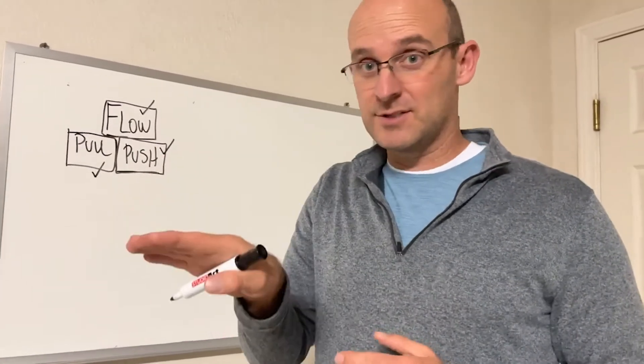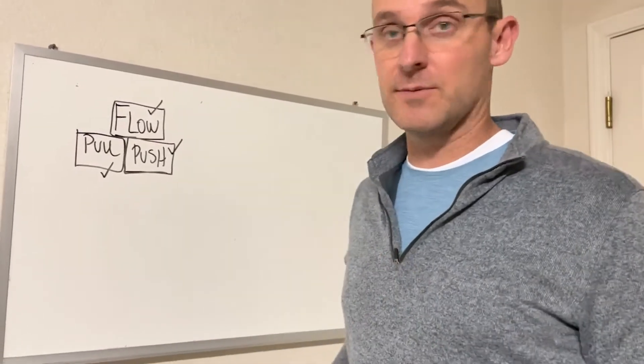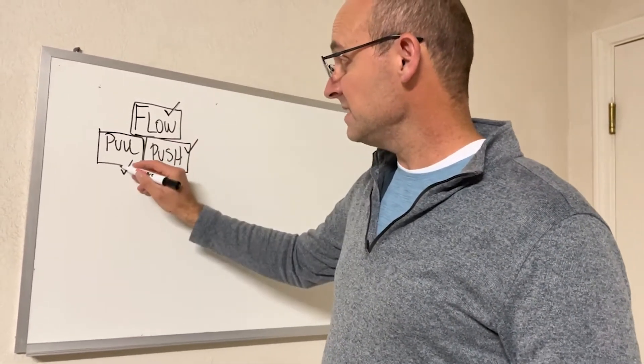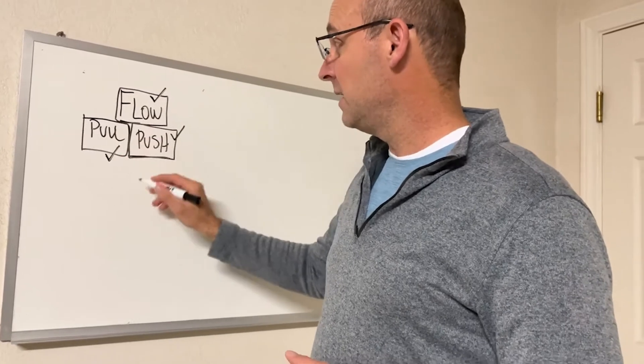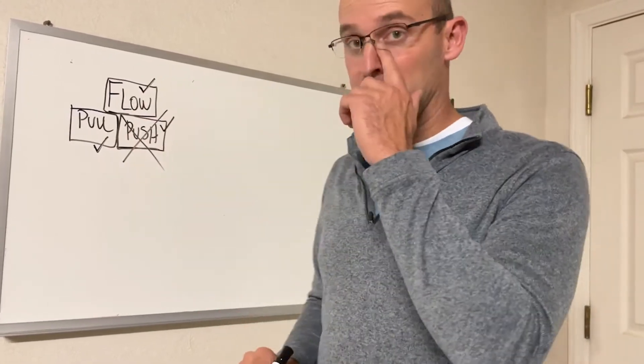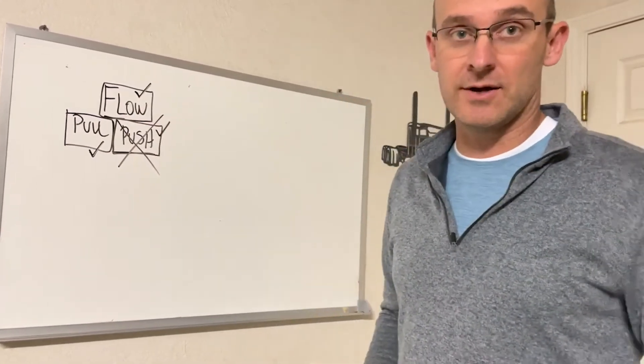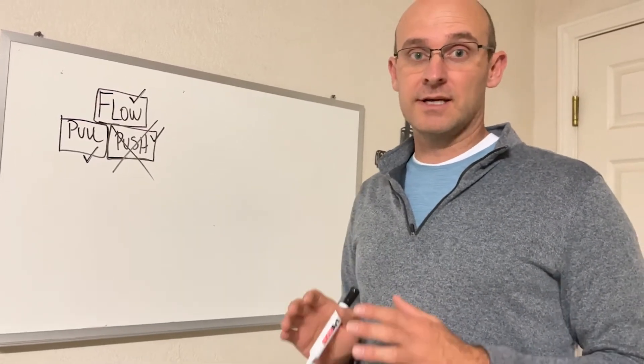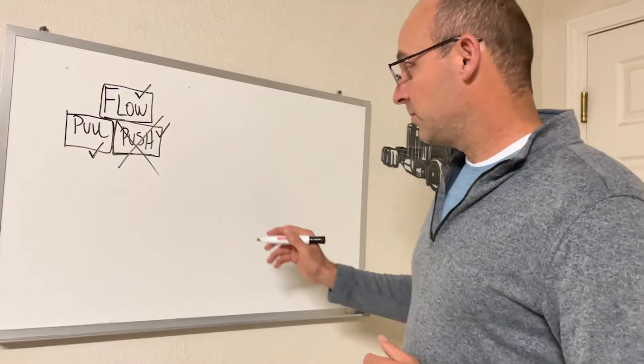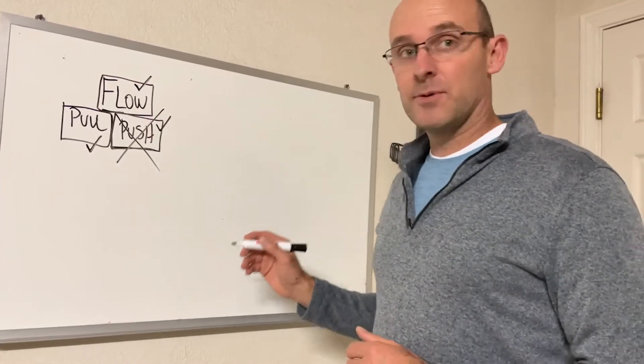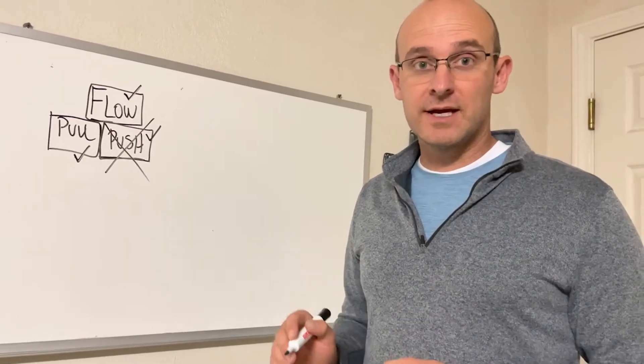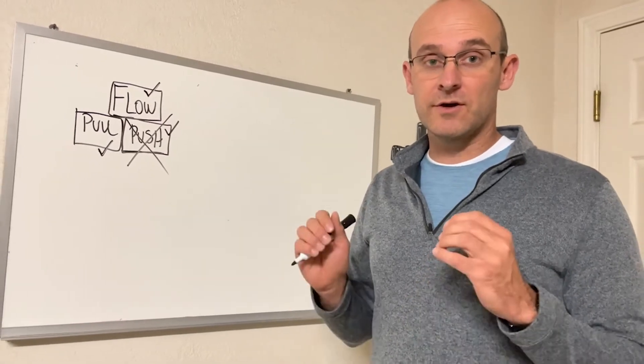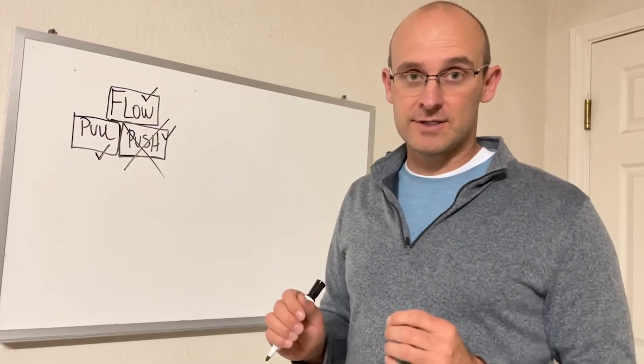And then push: regardless of whether this one's done, you're just pushing people on top of each other. So we always want to flow. When we can't flow, we want to pull. And we really want to stop pushing because in construction this just doesn't work out. A couple of really key things for us in construction is when we have crews on the project site, it is better for them to hold their flow and their start dates versus just pushing and filling empty areas.